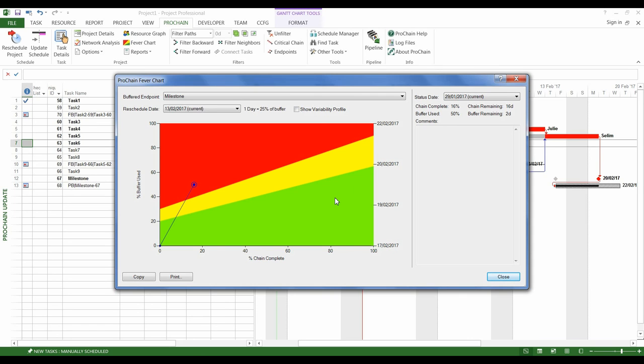The fever chart, which is the emblematic tool of the Critical Chain methodology, represents a powerful warning system to detect early the delays which endanger on-time delivery, and as such, it highly facilitates the project management.